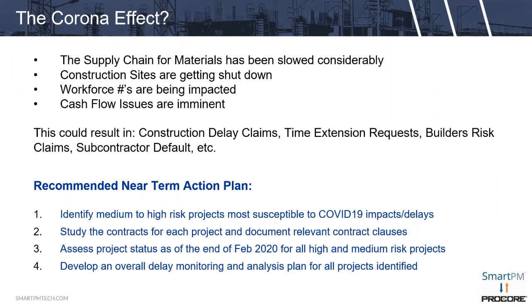I would say the right way to start this process is to go back out to the jobs that you identify here and make sure that you believe that the project's been statused correctly, the data is accurately reflecting reality. Make sure that you believe that the end date's achievable. Make sure that you don't believe that the schedule is too compressed right now, and that the other thing you want to make sure is that the schedule quality and logic is complete.